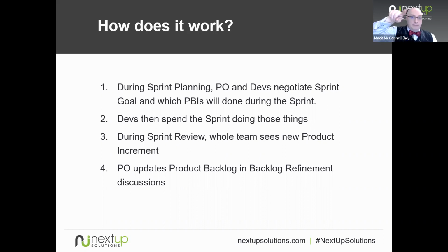And then the completion of that cycle, step 4, is the product owner then updating the product backlog in more backlog refinement discussions based on what they saw in the sprint review, based on feedback from stakeholders.